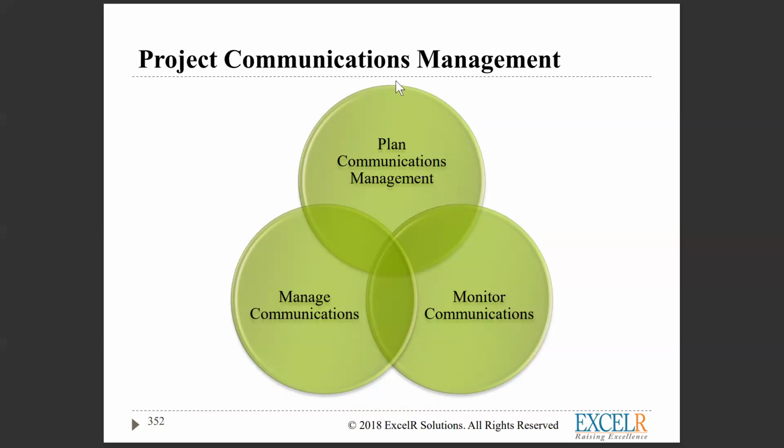During the planning phase, we plan the communications. What are all the things we are going to communicate? The status reports, how we are going to communicate, the reviews, when stakeholder management is going to happen, when the steering committee meeting is going to happen. All these things you plan in the communication planning phase, the project planning phase.